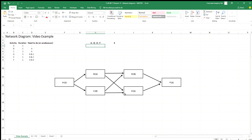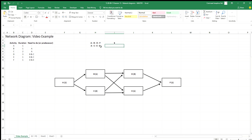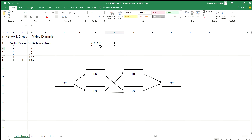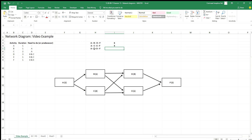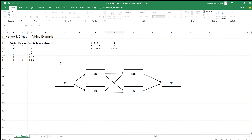The second route is A, C, E, and F. The durations are: A is 1 + C is 2 + E is 1 + F is 1, giving a total duration of 5. Now the third route is A, C, D, and F. The durations are: A is 1 + C is 2 + D is 3 + F is 1, giving a total duration of 7.